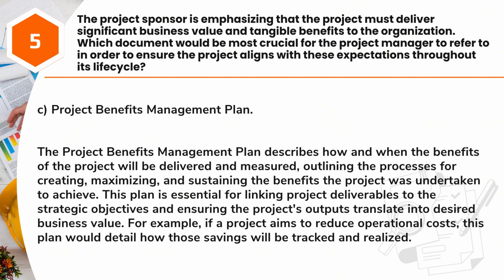Answer: C. Project Benefits Management Plan. The Project Benefits Management Plan describes how and when the benefits of the project will be delivered and measured, outlining the processes for creating, maximizing, and sustaining the benefits the project was undertaken to achieve.